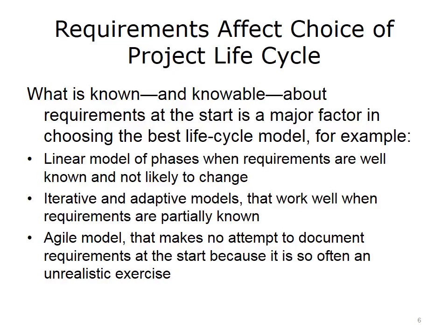In a large, multi-year healthcare IT project, you may use more than one of the life cycles. For example, you may use the linear project model for the overall project, knowing that you will start in this area and end in a different area. But then, you may use the iterative or adaptive model for a small piece of the project, such as an infusion calculator, where you are not sure exactly how it is going to work and how it will affect the overall process.